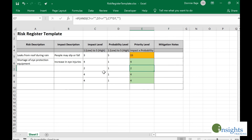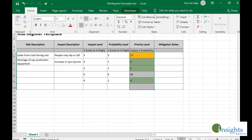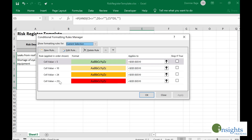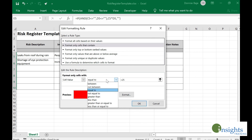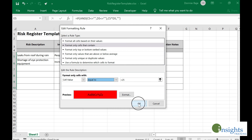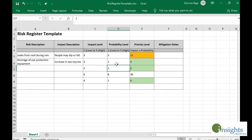We're not yet done, because what if the user enters a number beyond the leveling? Remember, we're only supposed to put 1 to 5. What if the user places a 6? That will compromise your report because you won't have a color rule for any number higher than 25. So we want to limit these cells to only accept 1 to 5, and that is the job of data validation.